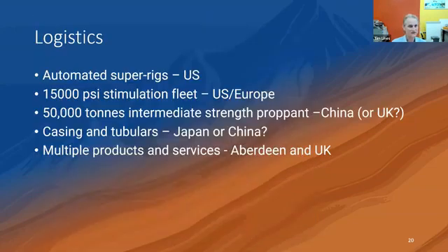Coming in now, so logistics. In our case, we need super rigs, and there's really nowhere in Europe that has the capability of both the physical equipment and also the teams to drill the kind of 10,000 meter wells at 270 centigrade that we're looking at. So we're going to the States for those. There are stimulation fleets in Europe.